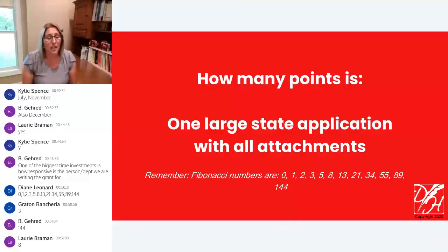And what you're trying to understand is, where are the small things? Where are my really big things? How am I going to fit all this together? If we saw that we have 4 really big things due in November, and we also knew that that's when, according to Kylie, that's when Kylie wants to be on vacation, we've got to navigate that some way differently because we've got one of our big extra larges due there. What we're trying to find is the relative size.